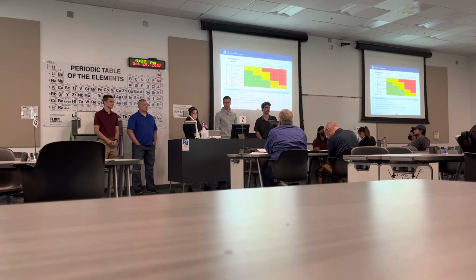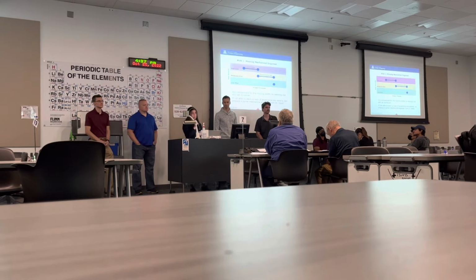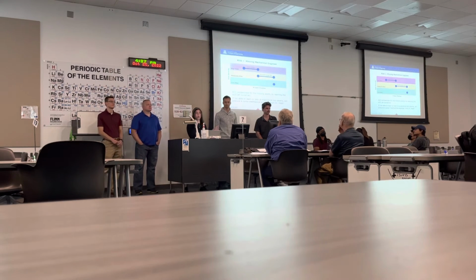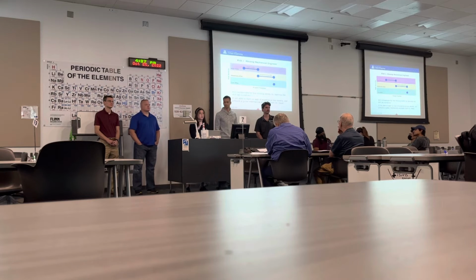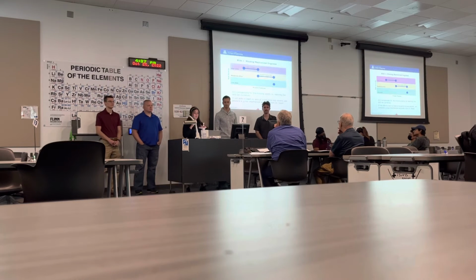Therefore, we have these arrows pointing towards where we want to get these risks, where they're in the moderate or low range. So here are our mitigation plans for some of the risks. For the first risk, being no mechanical engineer, our first mitigation plan would be to learn skills that are missing or apply skills that we already have, such as 3D printing and SolidWorks. But this still leaves us at some risk.